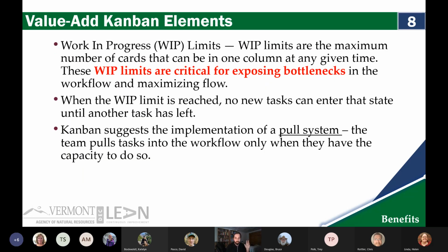So one of the most interesting things as a manager to take away from this is it introduces something called work in progress limits. And the idea being that individual staff have capacities in terms of how much work they can handle. And if you are having work progress through certain categories of work, you can look at it and go, whether by an individual level and say, this particular staff person is overstressed, this particular person has capacity, you can balance that workload, but you can also balance it in terms of workflow.